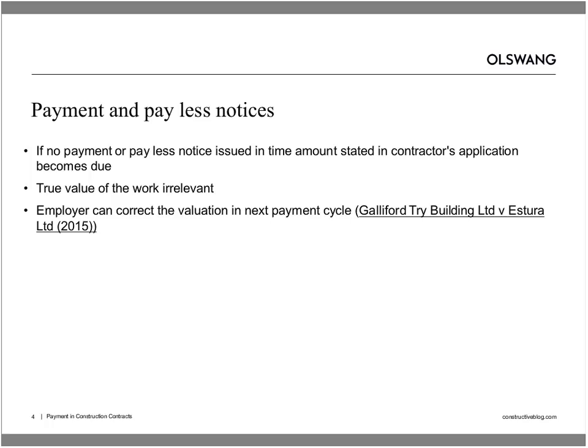So it's important to note there that the contractor is entitled to include within its payment application work that it expects will be carried out but is not yet being carried out between the application date and the relevant due date. The contract administrator then issues its interim certificate not later than 5 days after the due date, and that will state the sum that the contract administrator considers to be due at the relevant due date.